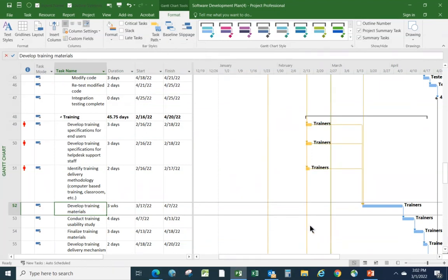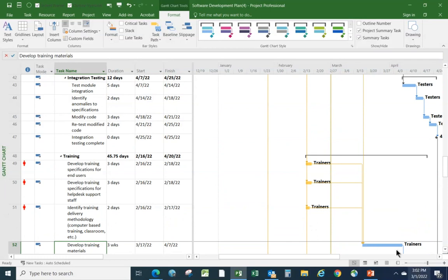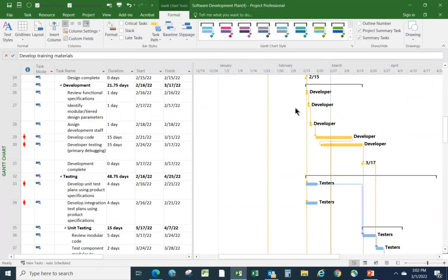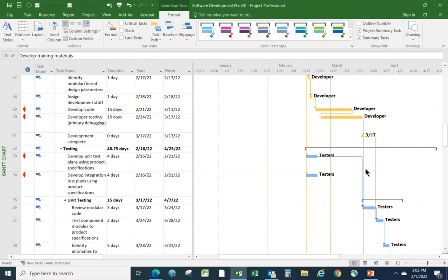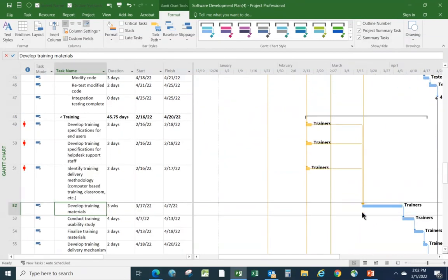And what that does is it highlights for us everything which is upstream in a dependency chain from the task that we've got selected. So these tasks are upstream because they're linked down through here. But there are some other tasks further back which are also linked upstream from us and end up linking to the beginning of task 52 here.